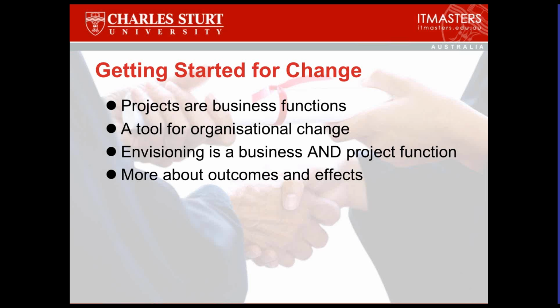It's talking about the outcomes and the effects or consequences that will come out of this project. It's not about defining the specifics of the project. It's about contextually understanding the impact of that project. So, for example, if we're talking about introducing a new CRM system into a sales department, we're not just talking about how many users, how many seats, how much data. Those are the details and the specifics. We're talking about how is this expected to help them sell?